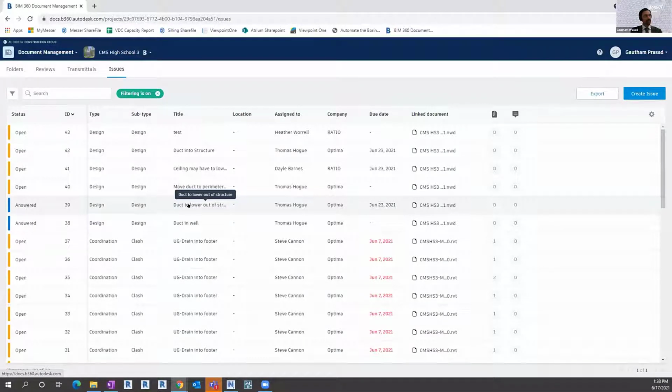And again, because it's a design review, we're not going through every single fine-tooth-comb issue. We're hitting 15 or 20 in a meeting. And now we're going from Navisworks up to the cloud. Or I should clarify, we can create issues in Navisworks that push up, but if you run your clashes in Navis, you can't push your clashes up. That makes sense. I may have said that too quick earlier.